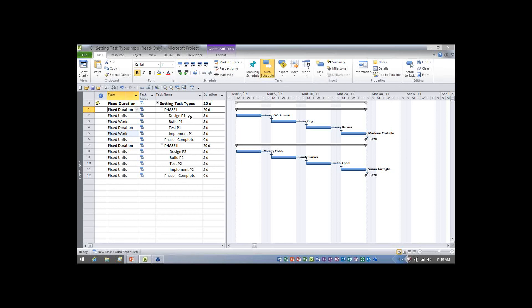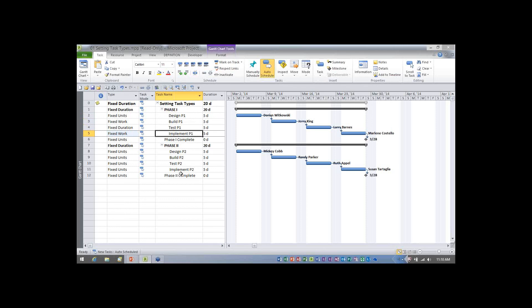Now one of the things I wanted you to notice before I put in the type column, there was no way to tell visually by looking at these first four tasks what the task type value was for them. There's nothing on the screen that will reveal the task type to you. You have to use one of those three methods to actually determine the task type.